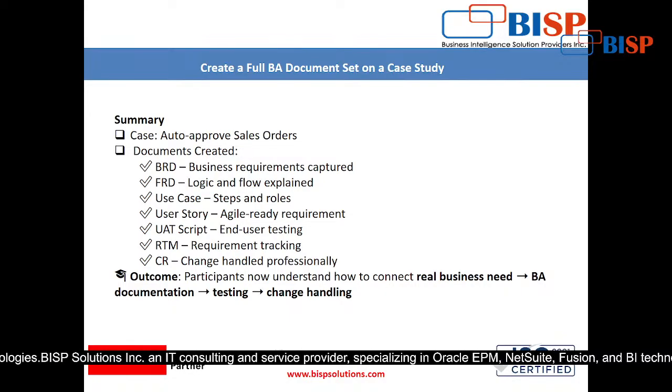Here there is one more document, that is the closure report document, the project closing document, right? In that document also, you have to write down what the project was, why these changes were needed, what we have done in that project, and finally what was the outcome, the reaction from the stakeholders. Everything will be documented in that document, right? That is the closure report.